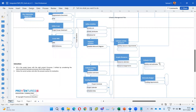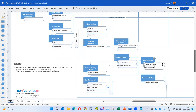Under 'Estimate Costs,' you get activity cost estimates, and also the basis of estimates — documenting on what basis you're saying the cost is $1,000 or $2,000. For example, one user license per month costs a certain amount; the project runs one year, so the annual budget is two lakhs — that is the basis of the estimate.